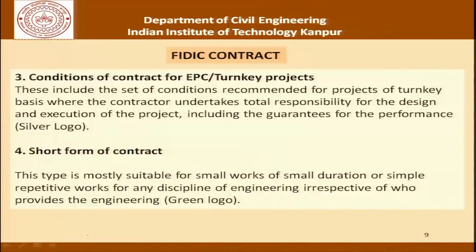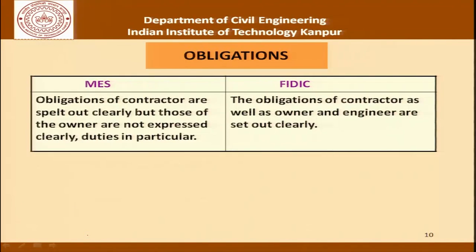Let us now go through examples comparing FIDIC contracting conditions with the MES contract practiced in India. One example is the condition of obligations for different stakeholders — the engineer and the contractor. As far as MES contracts are concerned, the obligations of the contractor are clearly spelled out, but those of the owner are not expressed clearly, particularly the duties to facilitate the progress of the work and enable the contractor to continue in an uninterrupted manner. Whereas in a FIDIC contract, the obligations of contractors as well as the owner and engineer are all set out clearly.